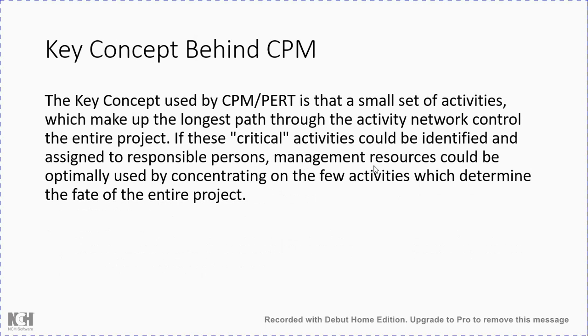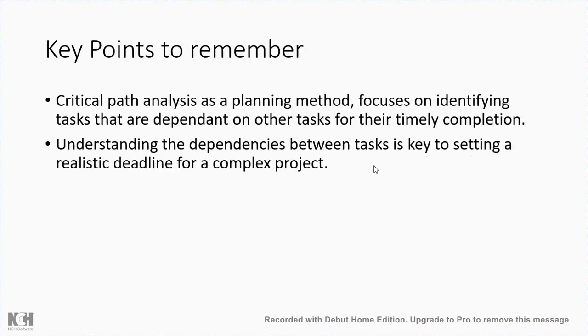So the key concept behind CPM is that a small set of activities which makes up the longest path, I repeat, which makes up the longest path through the activity network, controls the entire project. The ideology is that if these critical activities can be identified and assigned to a responsible person, management believes that these resources can be optimally utilized over the entire project.